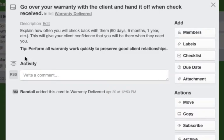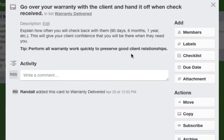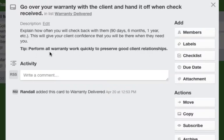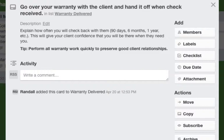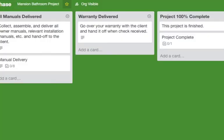The tip here is to perform all warranty work quickly to preserve good client relationships. It's so important. Don't let these things drag on and on because that's the worst thing you can do. It just causes more problems. More than likely they will find more things for you to take care of if you do that. Just try to get it done and have somebody there in 24 hours. That's the best policy.